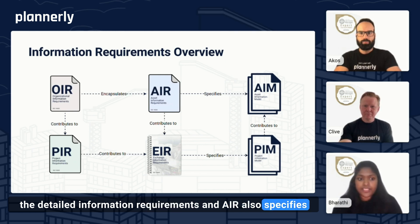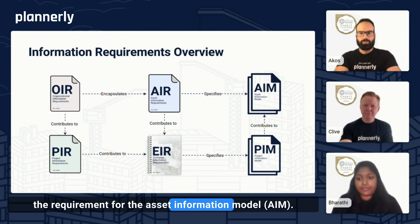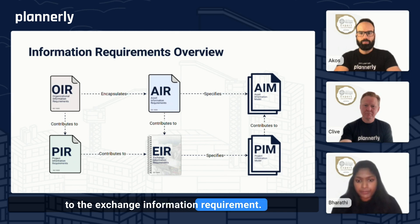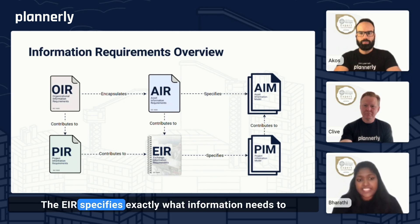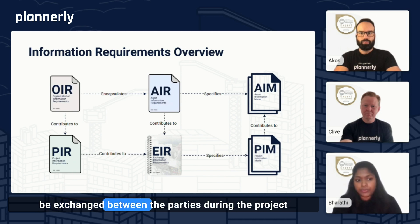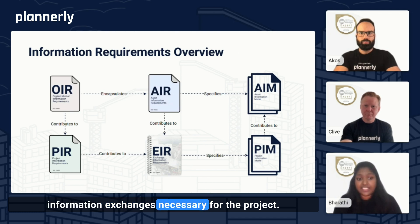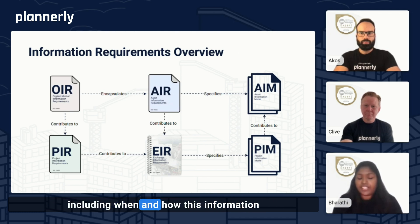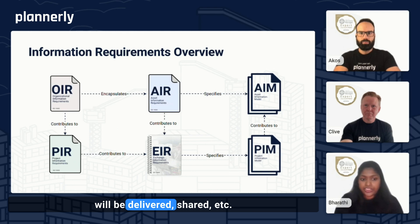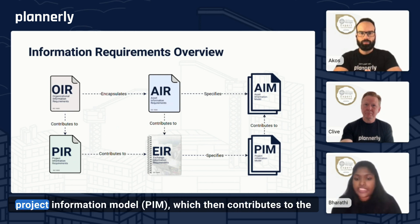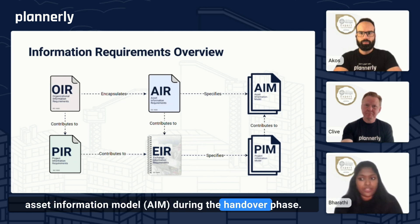The AIR also specifies the requirement for the asset information model. And finally, all of this contributes to the exchange information requirement. The EIR specifies exactly what information needs to be exchanged between the parties during the project, outlining the specific data and information exchanges necessary, including when and how this information will be delivered and shared. It also specifies the requirements for the project information model, which then contributes to the asset information model during the handover phase.